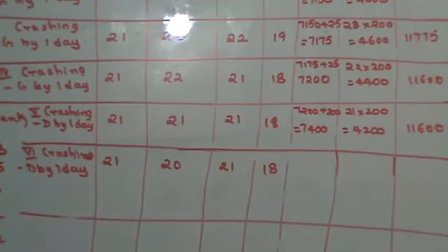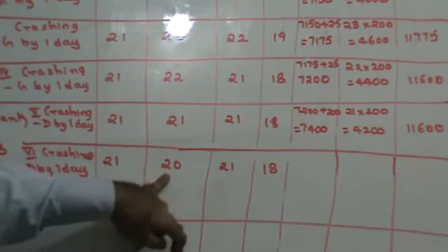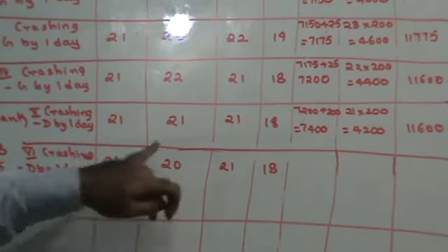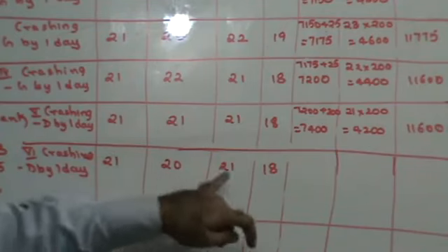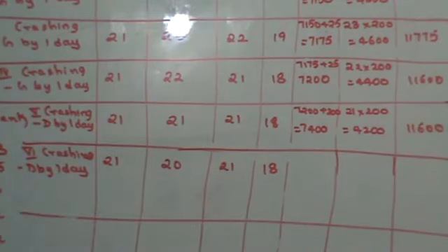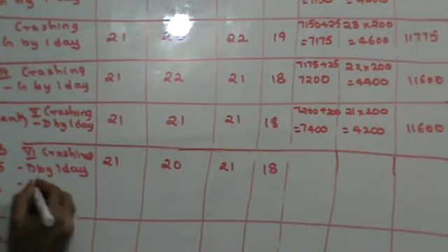What is the critical path? It is the path that takes maximum duration. Now I have to make sure that this remains the critical path, for which I will have to make sure that this and this get crashed. Now out of the first path A, E, H, I have A. A is the third rank. E is the second rank, and A is common to both of them. So I can do a crashing of A by 1 day.